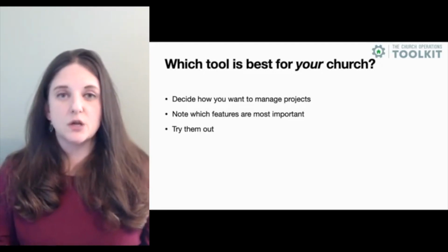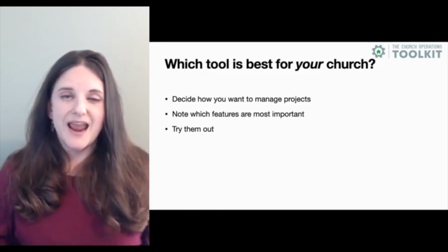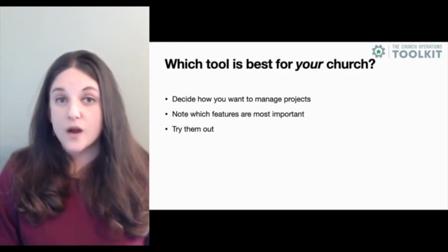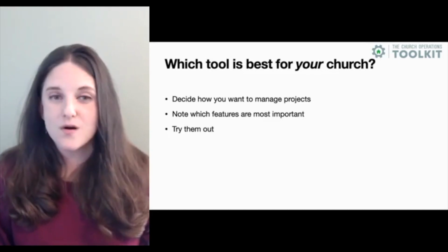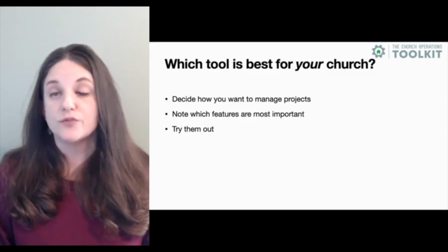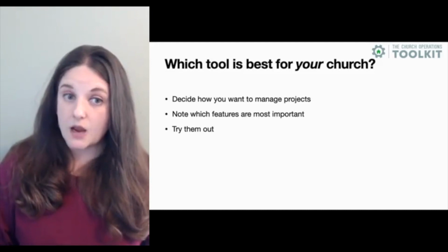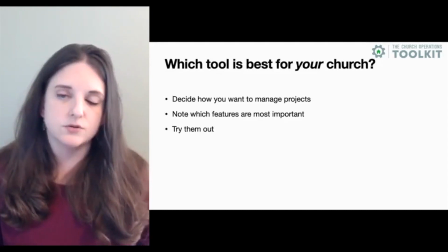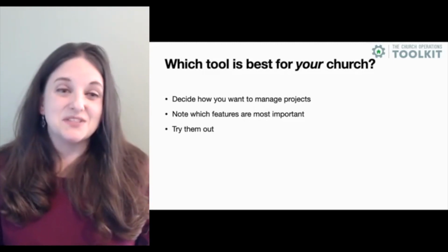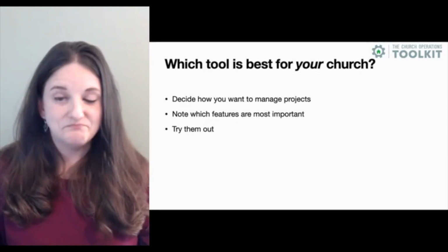Make sure that you include people from at least a couple different departments within the church, and include at least one person who either just does not want to use a project management tool or who isn't super tech savvy. Okay, because you need to make sure that it is user friendly and it is something that they'll actually enjoy using and will see the benefits of using. So try and include at least one kind of resistant person on the team to test this thing out. Because if you can get them on board, you're probably good with everybody else.